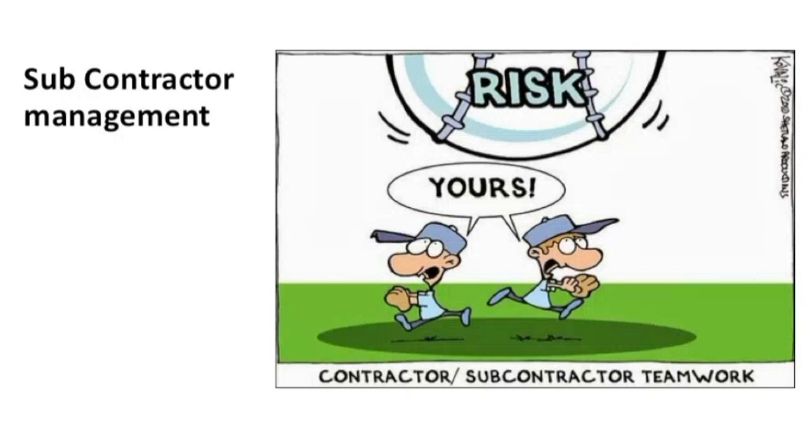Subcontractors can serve a number of useful purposes, reducing the overall need for labour employed by the main contractor. They can also provide specialist services such as lift and escalator expertise or groundworks, for example, which a main contractor would not normally be able to keep fully occupied. They can also help in managing peaks and troughs in the requirements of resources during the different phases of the project.